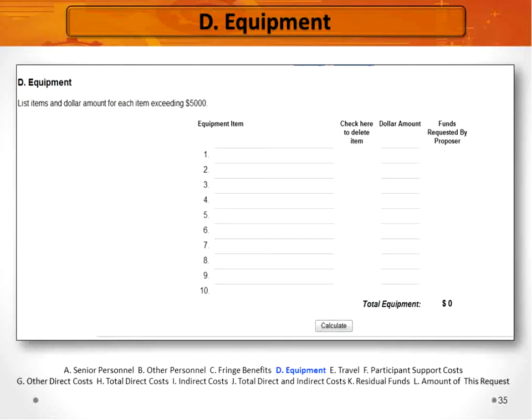Great, thank you. I have one final question, and that is, how much money can I budget for equipment? In the solicitation for the ATE program, it gives a $200,000 max, except for the case where a single piece of equipment costs that or more than that, at which point you want to contact a program officer immediately and tell them what's going on and ask that there be a waiver if you do need to ask for a very, very expensive piece of equipment. Thank you, Dr. Carter. We'll save additional questions for our next break, and we'll move forward on to our next slide.